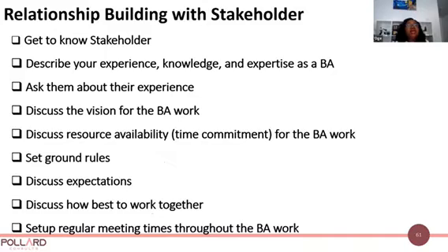And if possible, you can agree a recurring meeting, a regular time you want to meet. You could both agree, say, to meet one hour every week, and then you can set up that recurring meeting on their calendar for the period you think the project would last. Because people's calendars fill up very quickly, I try to book out a recurring time on their calendars once I'm able to get that kind of access. And if I don't need those meetings, I can cancel them. But as much as possible, block out times in the calendar for those meetings to happen.